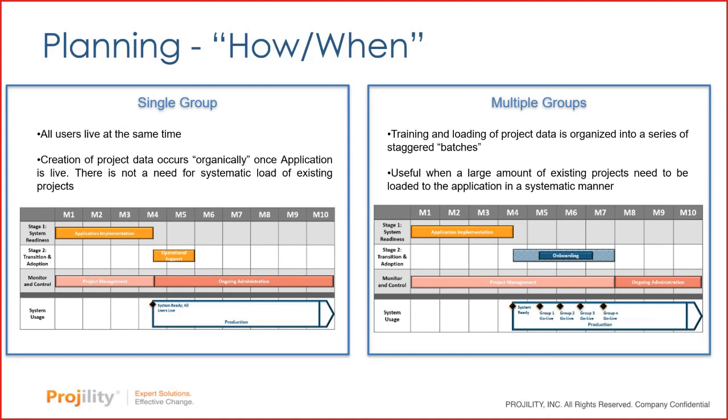Well, I can't tell you exactly how you decide that, but there's a lot of different options that you have. One of those options, right, is to pick a start date. All projects that are going to start after this implementation is done and completed is what will go into the environment. Or you could have a mindset of, well, any projects currently in the initial phase of planning are going to be moved in. Anything that's currently in execution or in the closing phases of their projects, that's going to just see it through its project lifecycle outside of the tool. But we're going to move in those initial projects that have maybe just started so we can track them using our tool. That's a decision that you as an organization need to make. And then there's obviously different requirements that will need to take place in order to make that happen as you roll out the project.